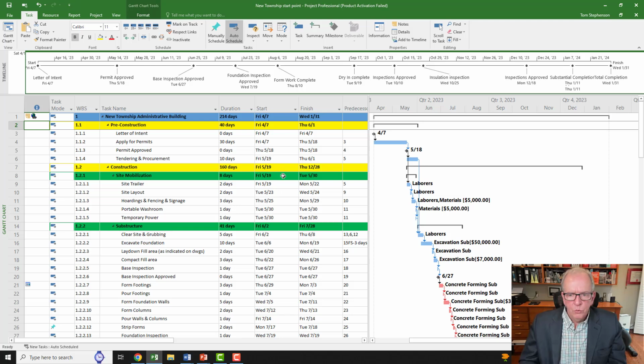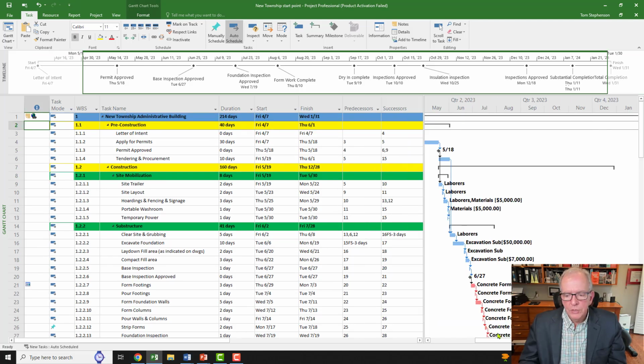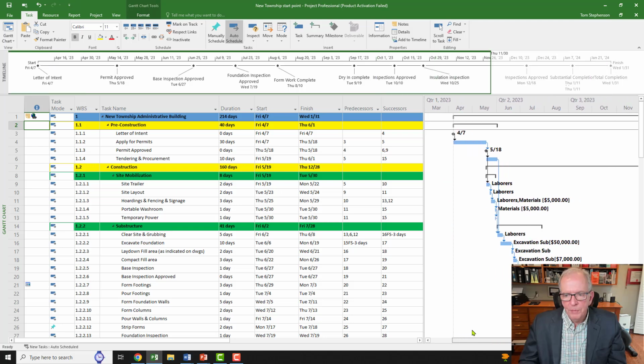All right, so we're back and we're going to look at this. Now I'm noticing, so it said to check for open ends. Right away I'm actually noticing that I've lost my critical path. So that's something that happens. Usually that happens when you have a constraint. So I see the constraint over there. So that's a bit of a problem. So we'll look at that.